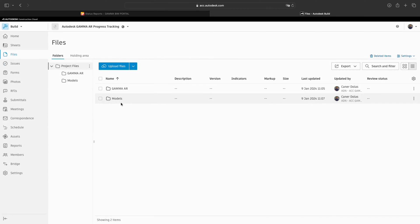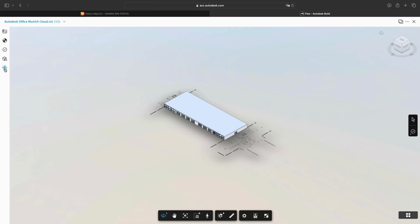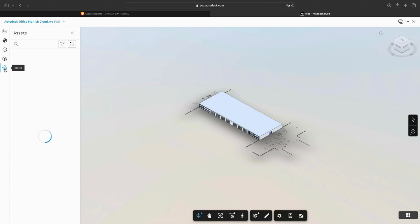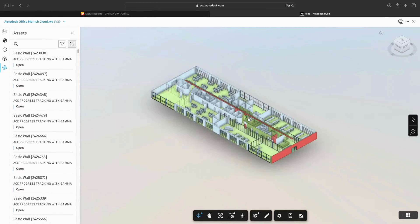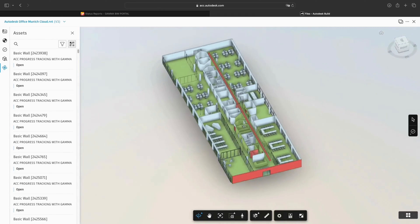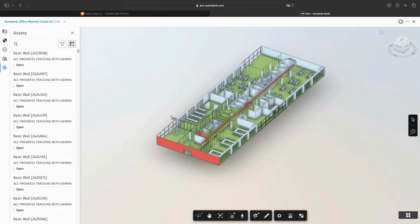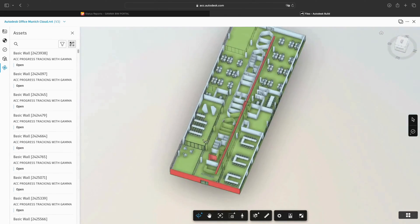To visualize the progress data within the 3D model, we need to open it up from the Files menu of ACC. When we now click on the left panel on the Assets icon, you will now see the colors of the objects changed to reflect their progress status. Green for Finished and Red for Error.